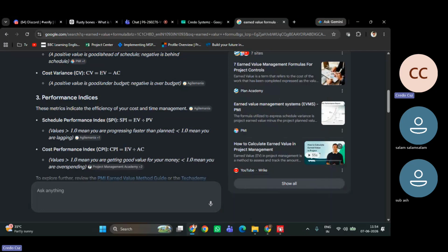In your project, you have to load the cost, then make the baseline. Otherwise, it's not at all useful. You will see many problems coming. Any cost, whether expenses or resources, has to be loaded before making the baseline.